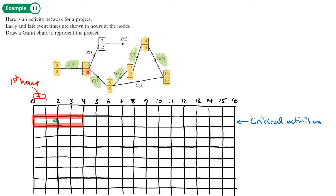Then the activity C carries on from that. That goes from four to nine. So all the critical activities go here. So that has a duration of five, four to nine. So that will be activity C. Then activity E follows that. And E goes from nine to 12. So all the critical activities go here. There should be no spaces between them.